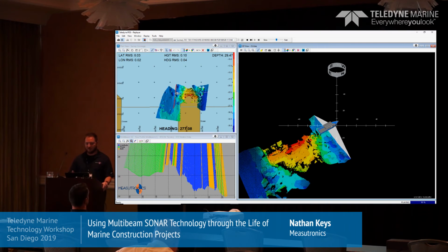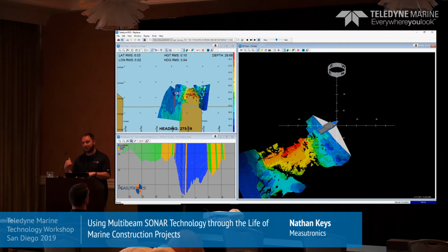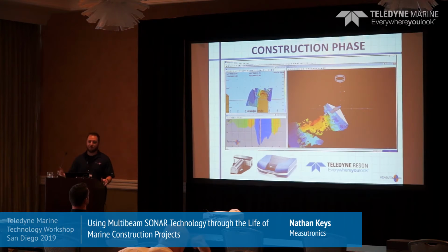If they hadn't met the level, then they could send this information back to the excavator, and the excavator can finish what he hadn't done. So they're doing this from a boat. They've got a bunch of excavators and a bunch of cranes out there, so this one boat is servicing a bunch of them. There are a few other ways we can do that, but for now, that's just one way. So as they're destroying it or building it, the boat is giving them real-time updates.